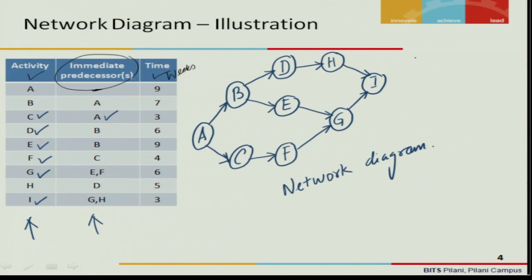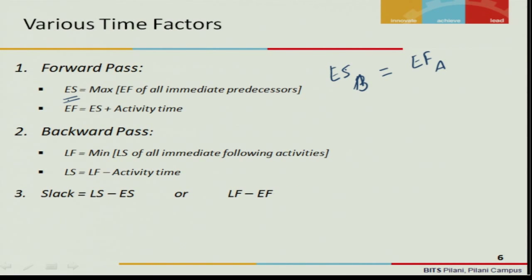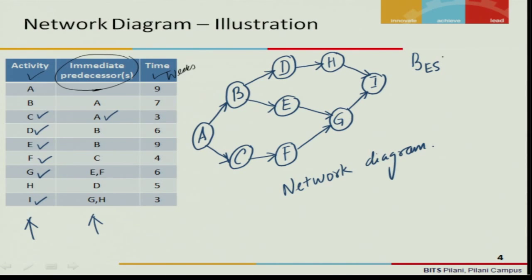If you want to find the early start of G, it will be the maximum of the early finish of E and F. This is what the formula means.